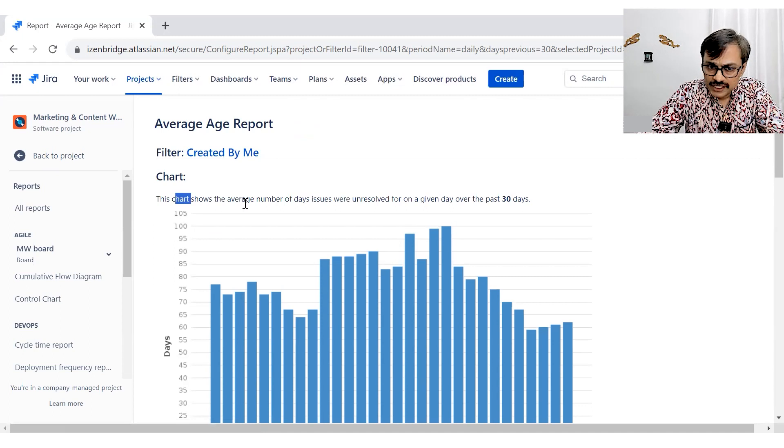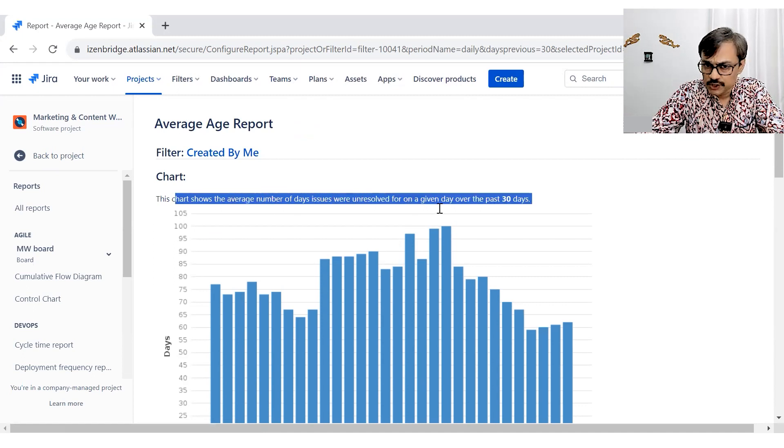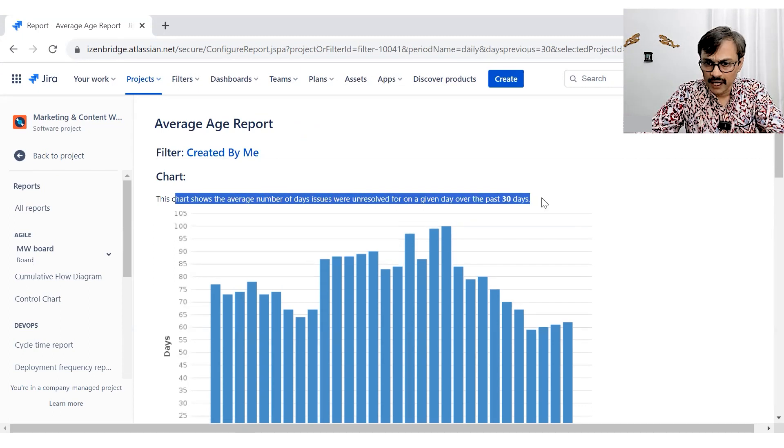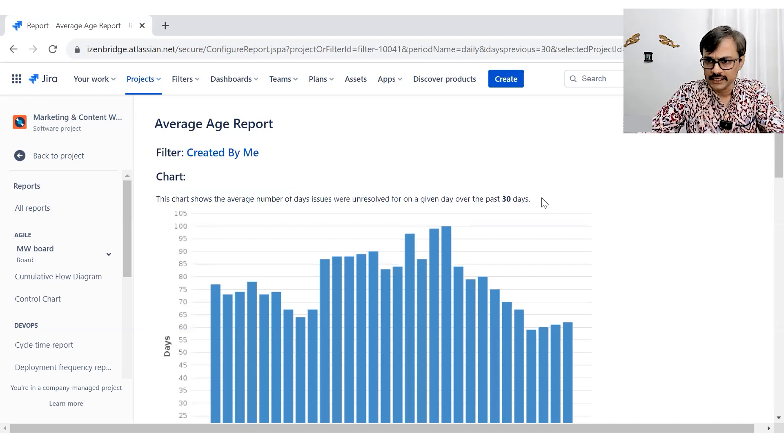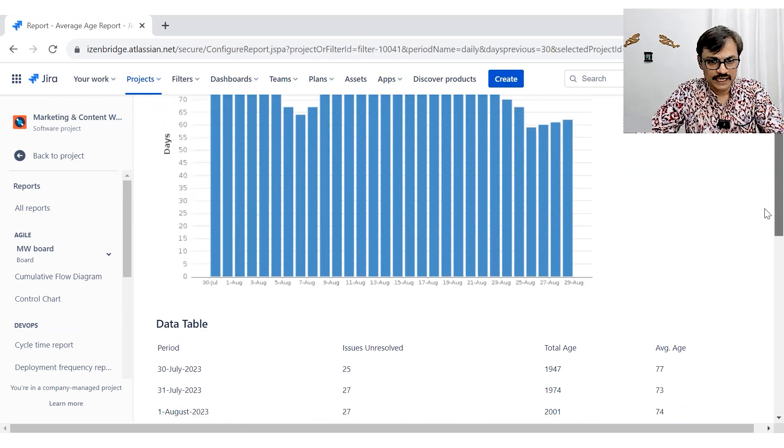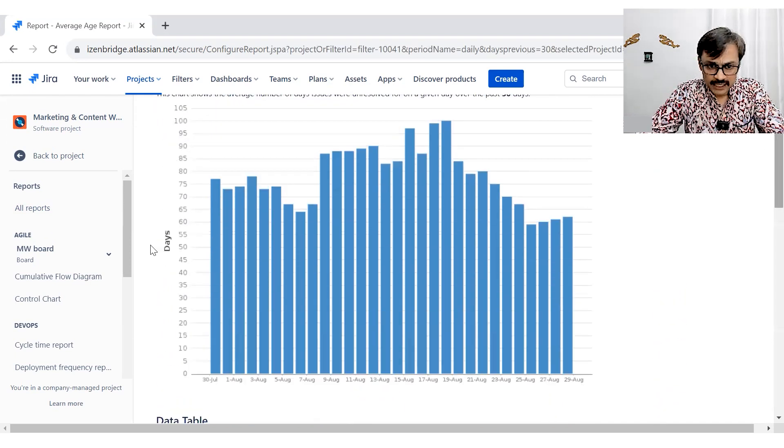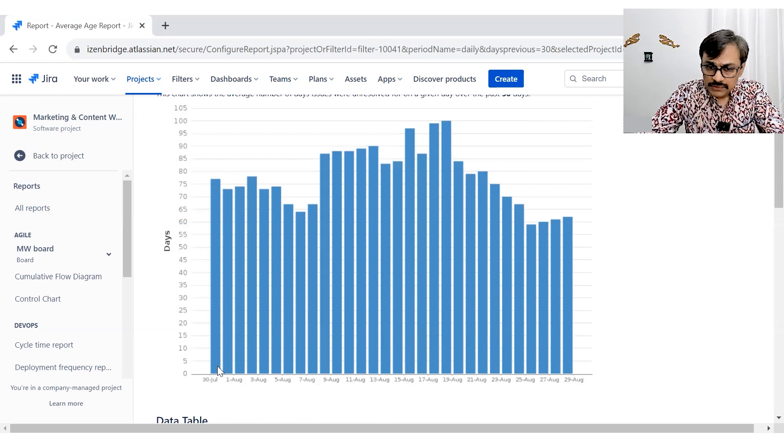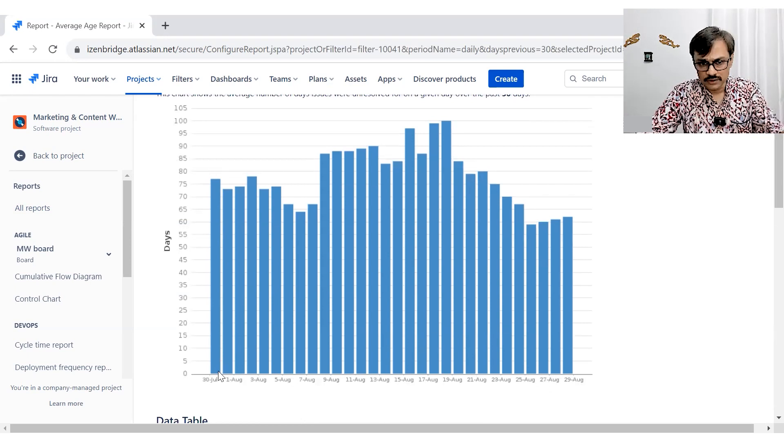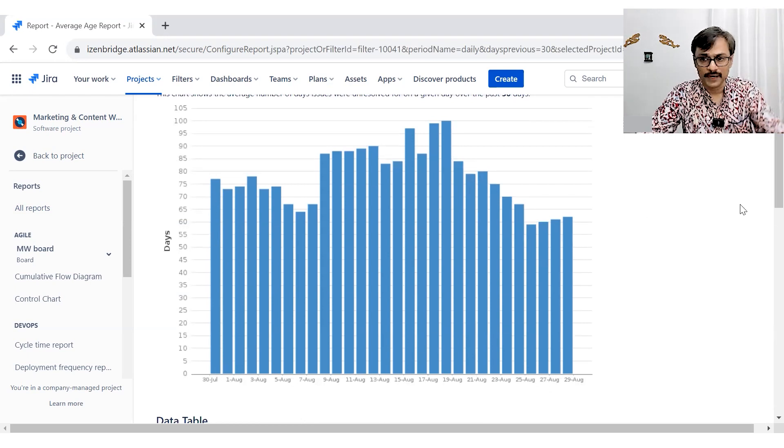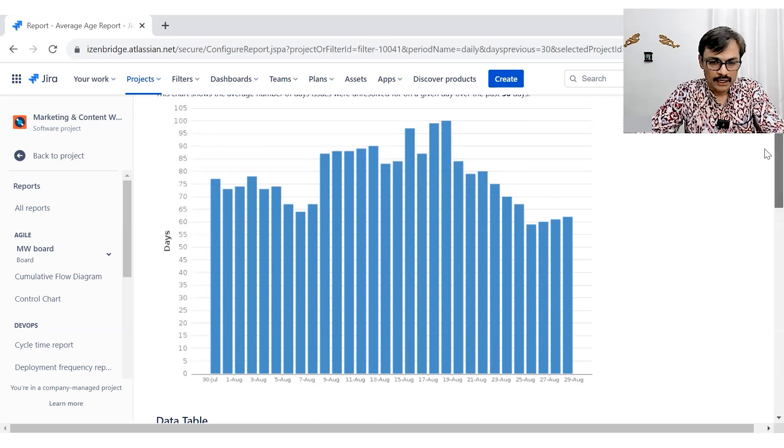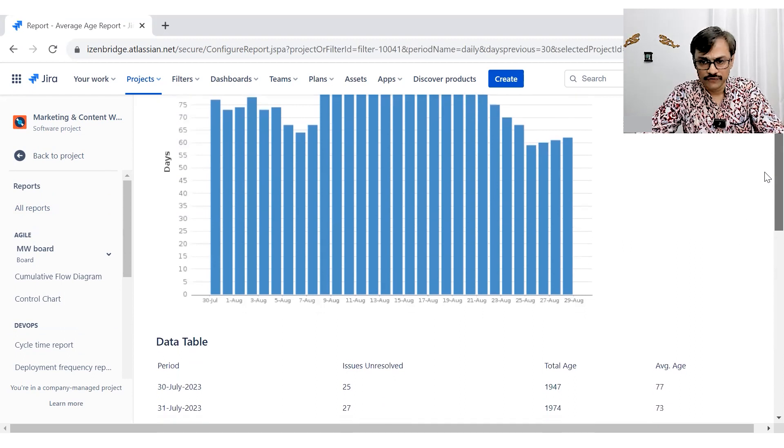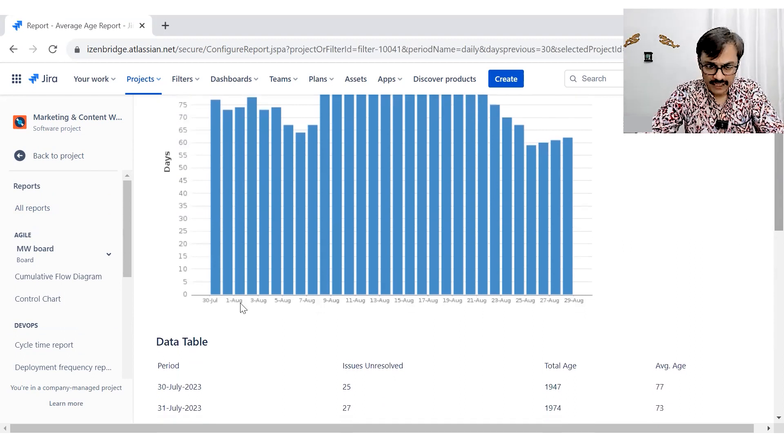So it shows the average number of days issues has been unresolved for a given day over the past 30 days. Now 30 days because we have selected here you see the days. So since the issue is unresolved, how many days have passed by divided by the number of issues gives you the average.